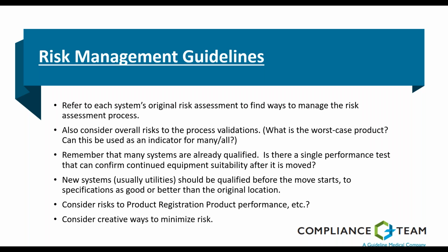You can do that. Like in my example, freezers and refrigerators. We had an interesting situation, and we were in a climate that's cold in the winter, and we decided that it would make the most sense to move our freezers and refrigerators in the dead of winter. That way we would have the least impact of the move.